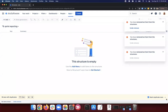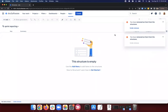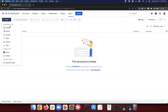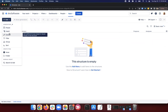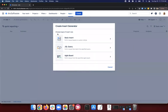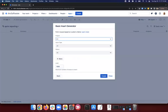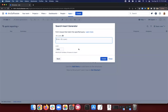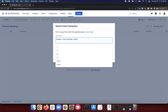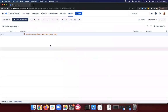These generators are the rules that build the structure. I can delete all generators and go to an empty structure — starting from scratch with a blank structure. There are basically two places we can start: presets are a nice starting point, but I want to explain these one by one. By adding them piece by piece, I'm doing them one at a time. I'll choose the JQL inserter rather than the basic UI. So I'll say my project is Mars and my type equals story — now I get a flat list of stories.